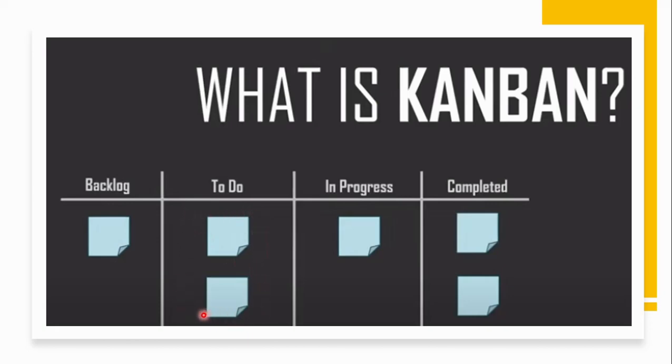But in Kanban, what they say is it's a pull system. Actually, Agile is a pull system. So once one item comes to the progress and goes to the complete, any column cannot be blank. So then you take another one from the backlog, and that goes to the progress, and then it goes to the complete. Then you take another one from the backlog. So likewise, it's not a time boxed iterative cycle. It's a continuous process of development. Got the picture?